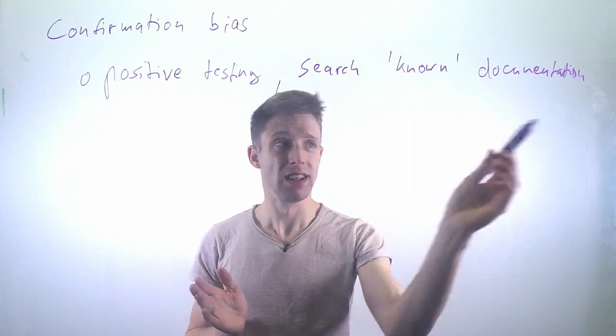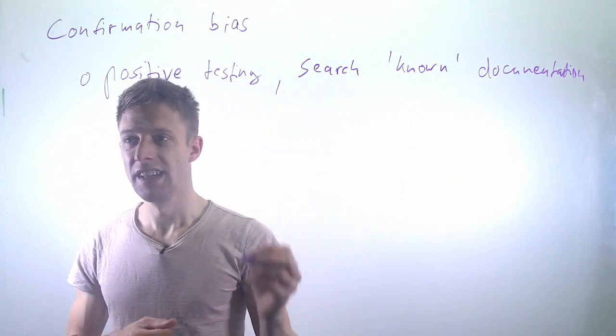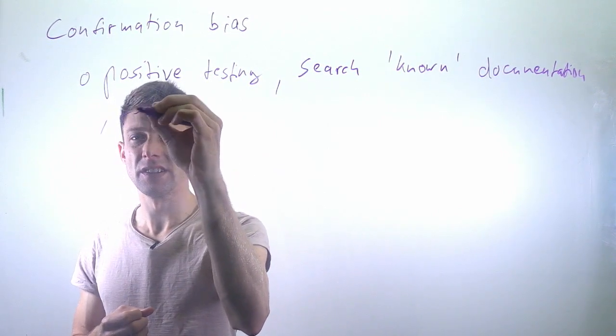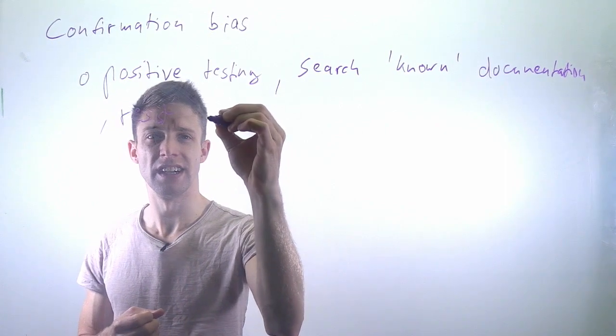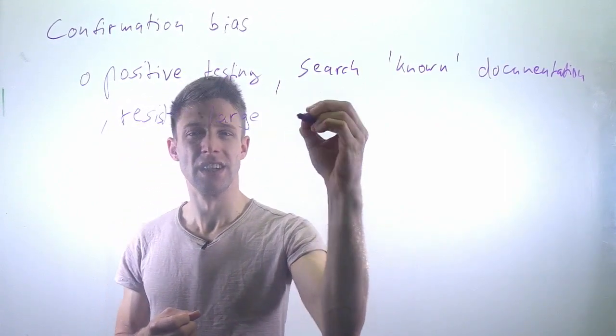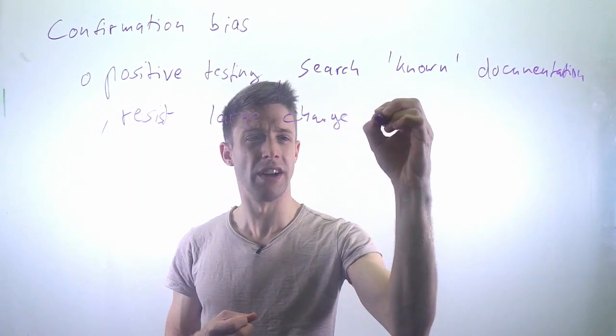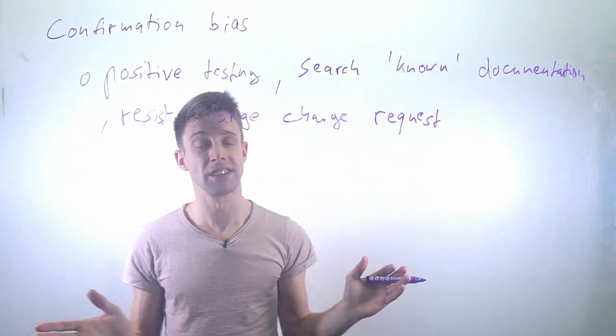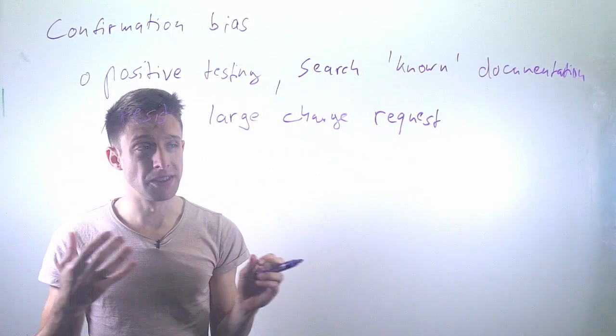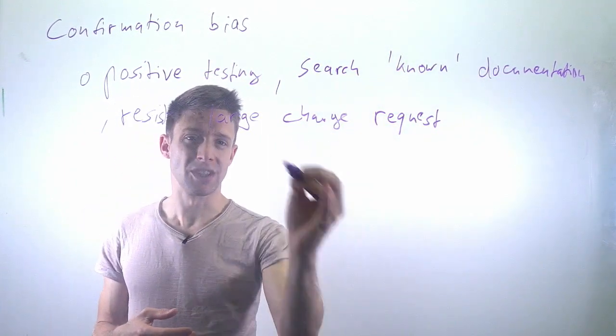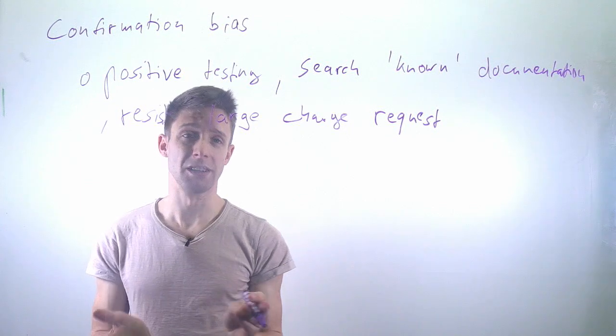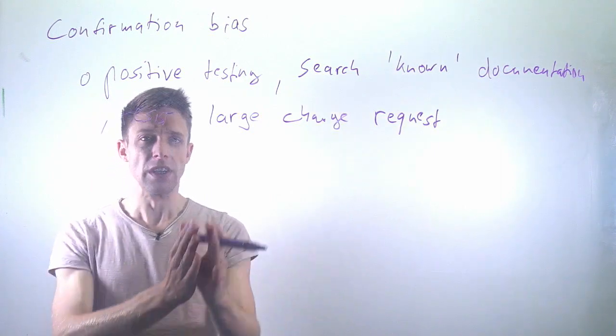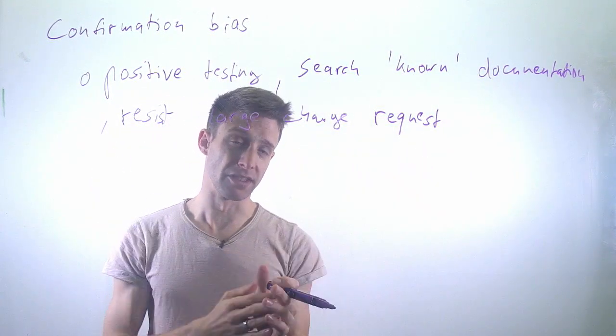We see similar effects when it comes to changes. We tend to resist large change requests. If, for example, a customer or outsider on GitHub comes and says 'we need to change this,' and it's a very large change requiring a lot of work, you will unconsciously resist this and try to find arguments for why the change request is not necessary or why something smaller could be done.